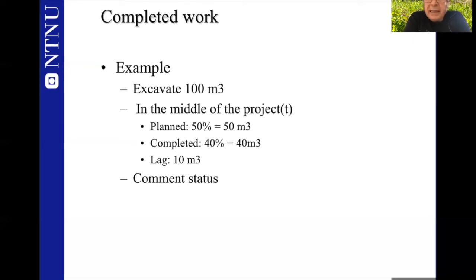It might be the case that to produce these 40 cubic meters, you have used only half of your resources and you save the other. So these numbers tell you something about the amount of work, but they don't tell you anything about the amount of resources that you have used in this situation.